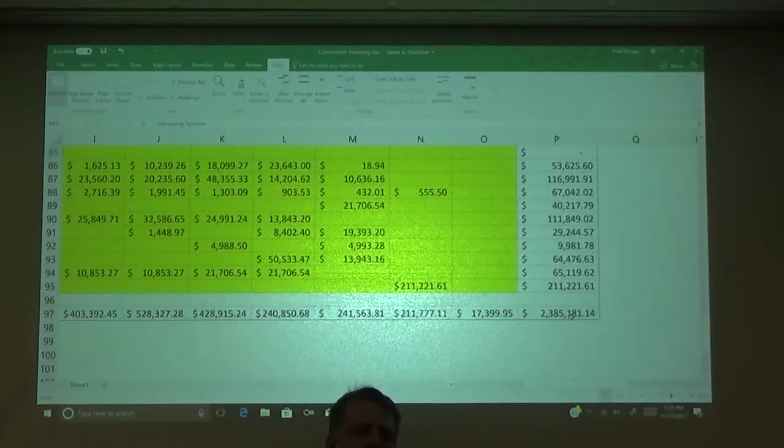But you can also find ones that give you a fairly nice average breakdown by component for property type. The one that I sent you via email works by property type or product type: you pick a product type, put in the geographic location, and it pretty much spits out an average overall value per square foot that you would use as a construction cost.